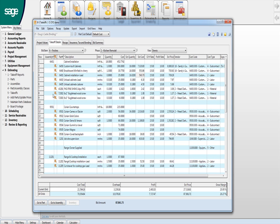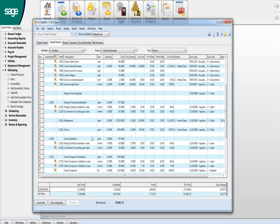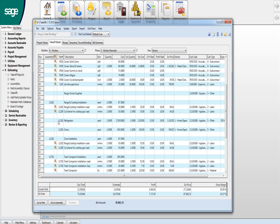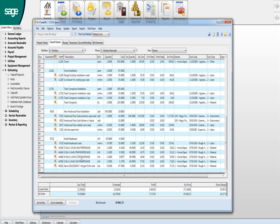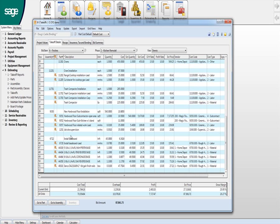So once these are built, the next job is just a piece of cake because you're just popping in these assemblies or just bringing in an old job in and just changing the quantities. If I scroll down a little bit, here's a range top and cooktop installation. Man hours to do each one of those. The refrigerator, the oven, oven insulation, the trash cabinet. So all of these things are in here.